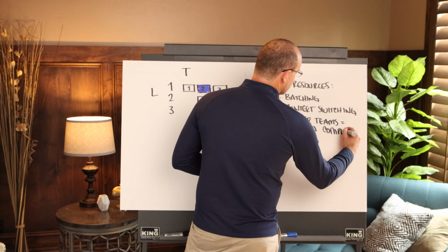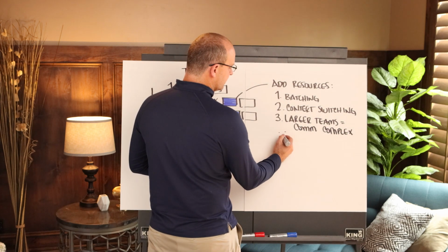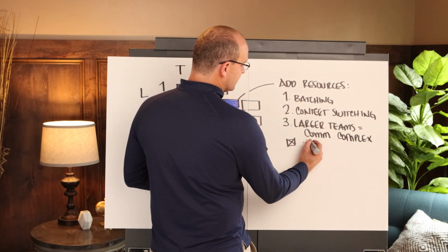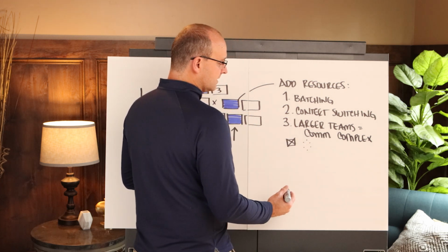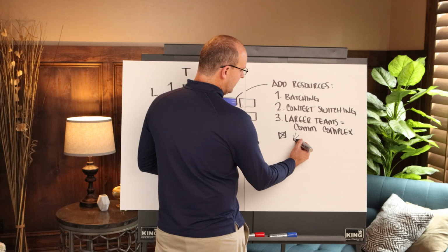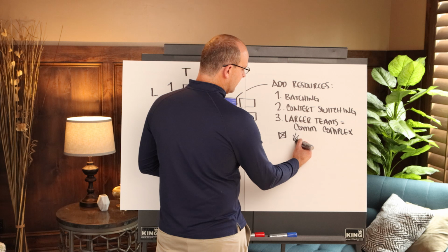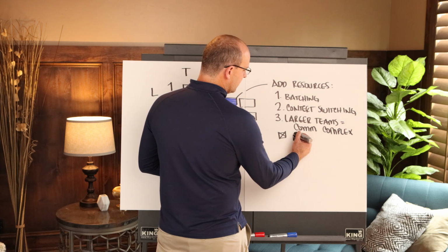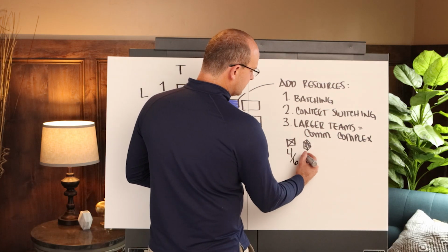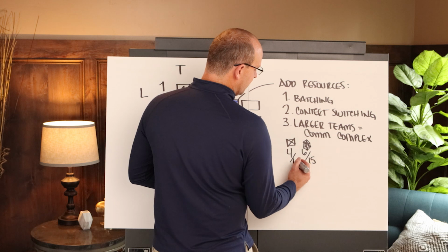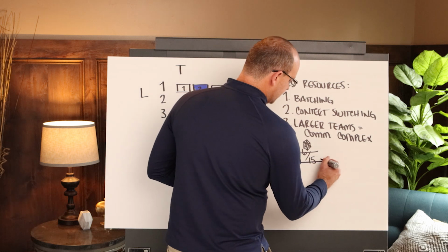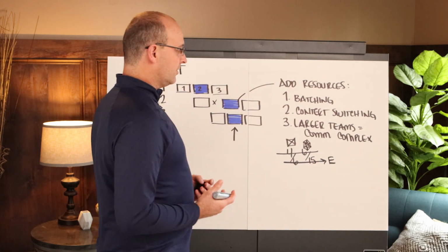So I like to go ahead and draw it like this. If you have 4 people on a team, that's 1, 2, 3, 4, 5, 6 communication channels. If you even just did 6, just from a relative example standpoint, this is going to be hard for me because it's so much. You got 1, 2, 3, 4, 5, 6, 7, 8, 9, 10, 11, 12, 13, 14, 15. So this was 4 and 6, and this is 6 and 15, right? I think I got that right. But anyway, you can see that as this becomes incremental, this becomes exponential with an E, and your communication gets really complex.